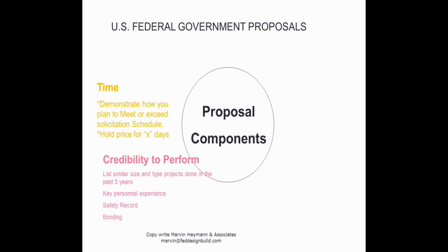Time. The government's going to tell you how many days they want the project completed in. They're also going to tell you that you need to hold your price for so many days. So you're going to prepare a plan, usually a project management plan, and a schedule that demonstrates that you can meet or exceed the solicitation schedule's expectations.